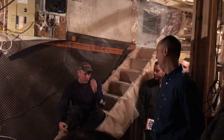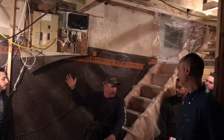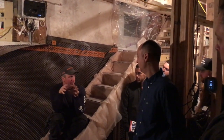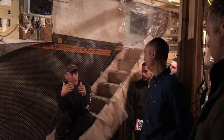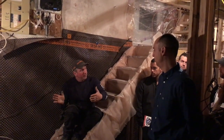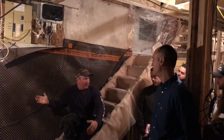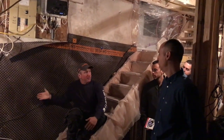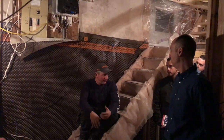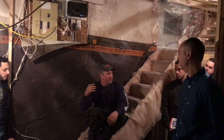Yeah. Okay, so what happens when you're building is, a lot of people leave 2 exterior walls, and usually it's the walls that are closest to the lot line, because you're only allowed to have so many windows there because of fire separation. If you were to demolish and rebuild, you might have to step the house further away from the lot lines, because these houses were grandfathered, and now you've gotta stay, what, like 1.5 meters or something, and so then your house is smaller. So they maintain those exterior walls, and also, if you rebuild the house from scratch, there are additional taxes that you have to pay. And so they leave a couple of exterior walls, demo everything else, and go up from there.